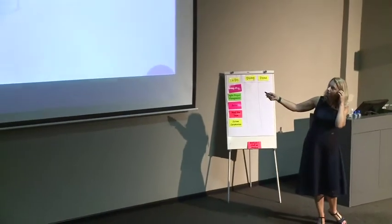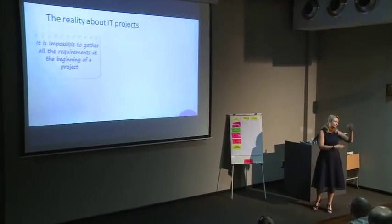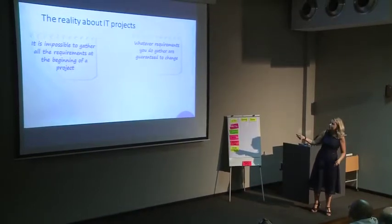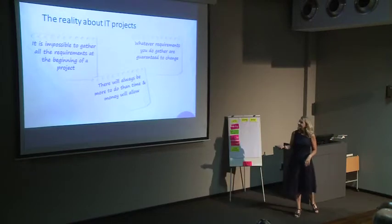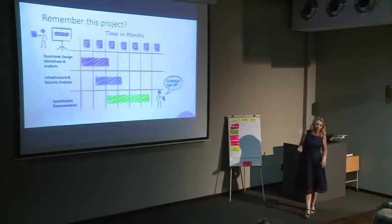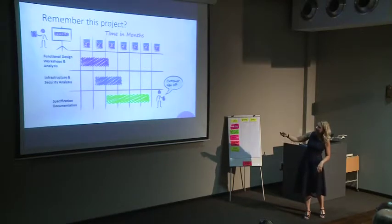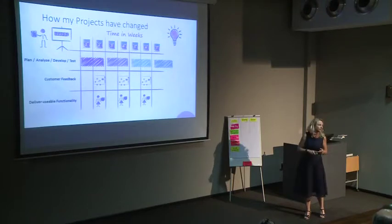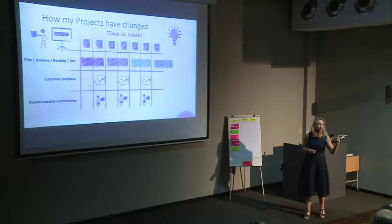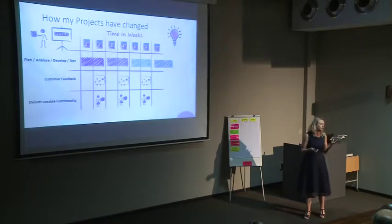Reality about IT projects: it's impossible to gather all the requirements at the beginning of a project — business thinks they know what they want and then halfway through they realize they also want 50 other things. Whatever requirements you do gather are guaranteed to change, and there will always be more to do than time and money will allow. Remember that first project I told you about? Here's how my projects have changed: instead of months, we now have time in weeks. For every two-week sprint we do planning, analyzing, developing, and testing. As a team we work together toward a shared goal, get customer feedback at the end of two weeks, and may deploy new functionality every two weeks.